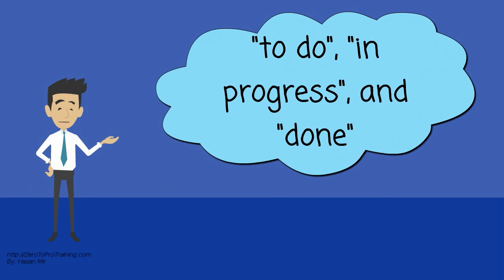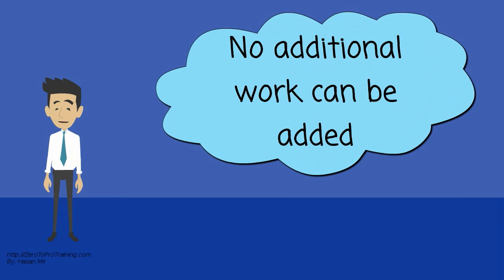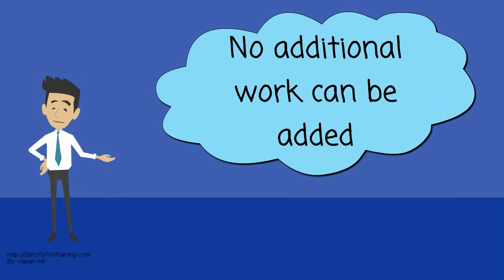Like to do, in progress, and done. Once a Sprint Backlog is committed, no additional work can be added to the Sprint Backlog, except by the team.